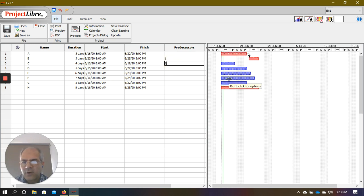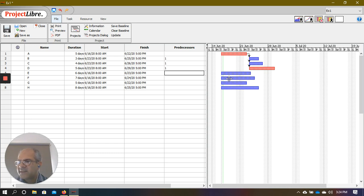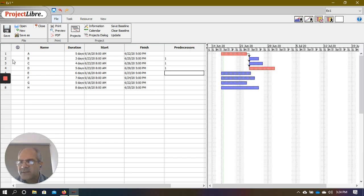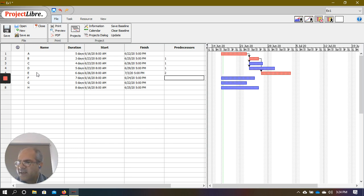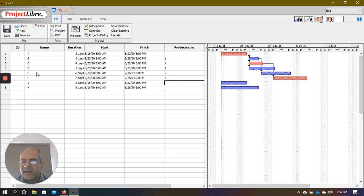Activities C and D also have task ID 1 as their predecessor, meaning A is the predecessor for B, C, and D. Activity E has B as a predecessor — B has task ID 2, so I put 2. Activity F has C as a predecessor with task ID 3, and G has D as a predecessor with task ID 4.